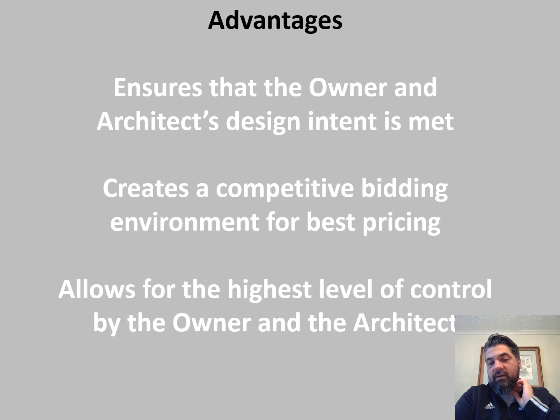The next advantage is that it creates a competitive bidding environment for best pricing. So not every contractor is going to bid every job. They're going to bid the jobs that they feel they have the capacity to do and are qualified to do. But of that pool, presumably the general contractor will assemble the best subcontract prices, and additionally, with the general contractors competing against each other, they will deliver. You will end up selecting the lowest responsible bid from a contractor.